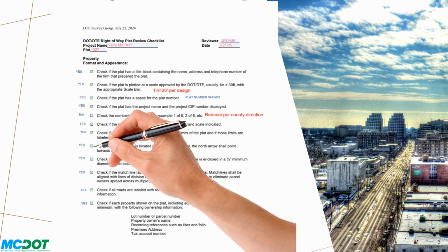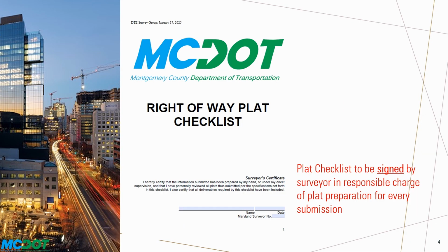We have received incomplete and improperly formatted plats from consultants as the initial submittal, sometimes apparently directly from the CAD designer, with no evidence of actual review of the plat standards checklist or any internal QC on the consultant's side. In an attempt to mitigate these issues, in the last major update of the standards checklist, we added a surveyor's certificate.